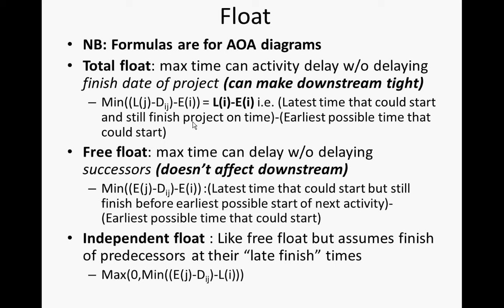Okay, that's described there. Free float, by contrast, is the maximum time you can delay without delaying any of the successors. The issue here is that, particularly in some domains such as engineering and construction, this whole issue of total float can be contentious. The problem is that if different parts of a project are being done by different people, say by different contractors, suppose I'm on a part of the project which has float, and suppose I eat the float.